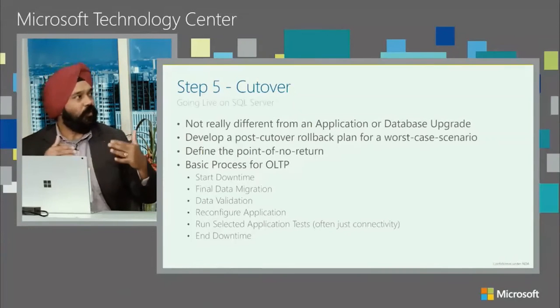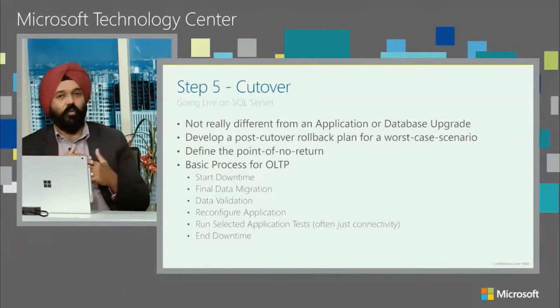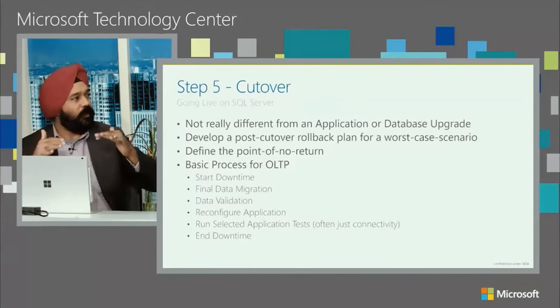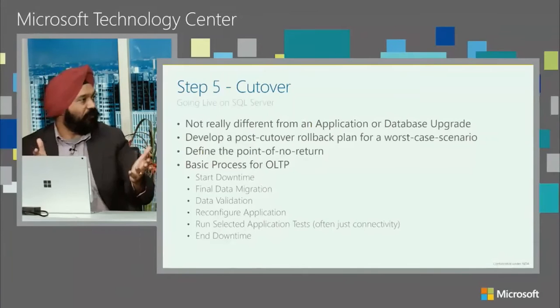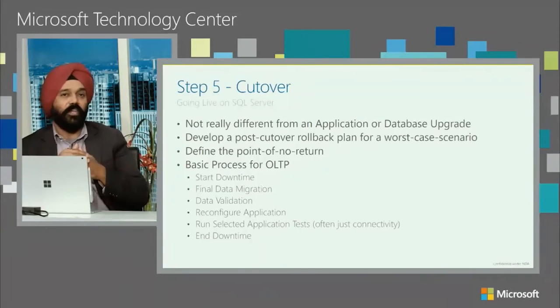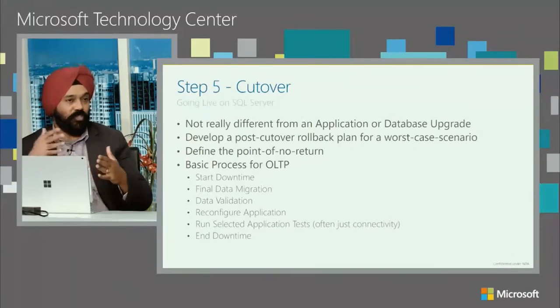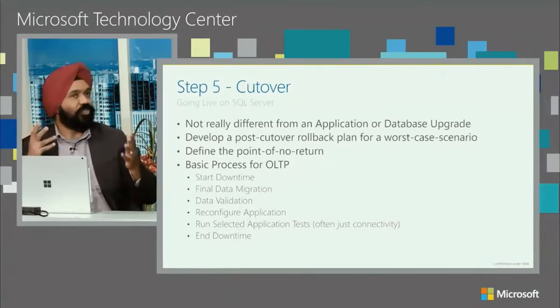Then you have your medium complexity applications, where when you're doing the cutover, you probably want to do real-time data replication beforehand, using CDC, for example, and make sure that all of the applications are running in parallel. So they're running on Oracle, and for, let's say, 30 days, they're also running on SQL Server. So the users are getting comfortable, and data is being replicated, so they're looking at real data.